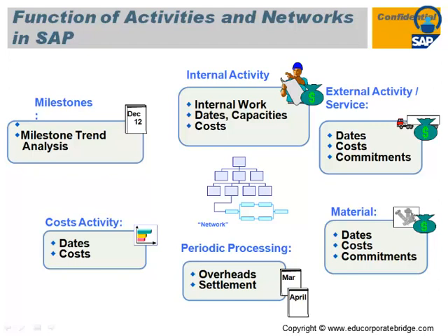So for that, you need to create an internal activity. The external and service activities are specific to your subcontracting or vendor work. If you want to capture the cost for subcontracting or a vendor, you have to create an external or a service activity. External is the unplanned one, and service is the planned one.